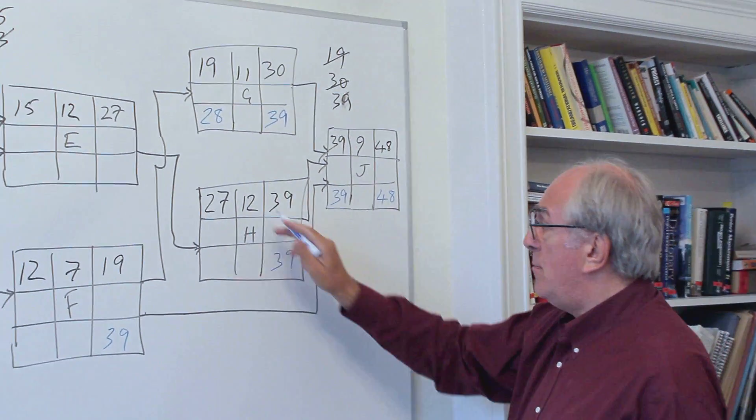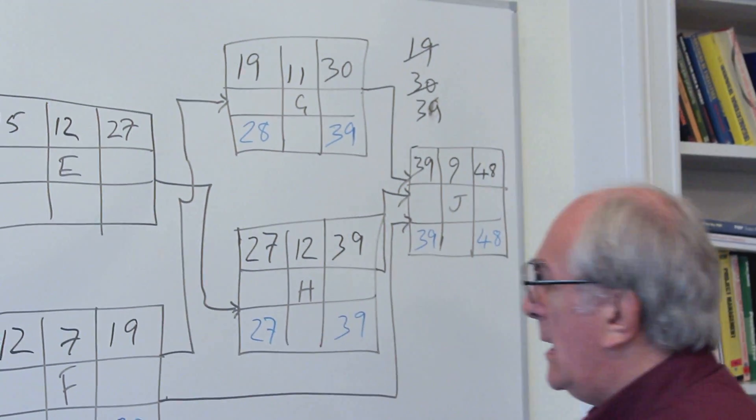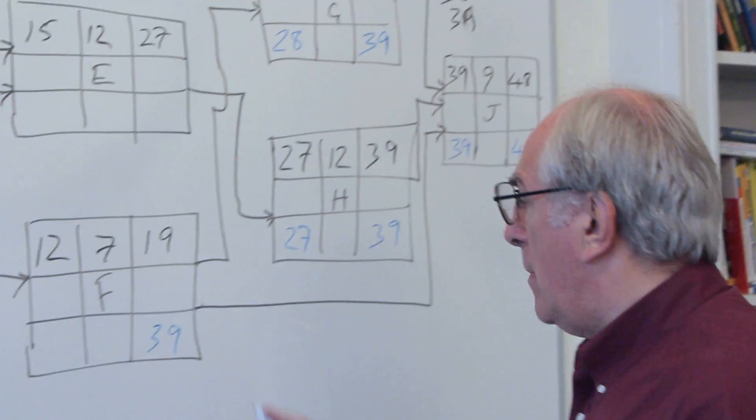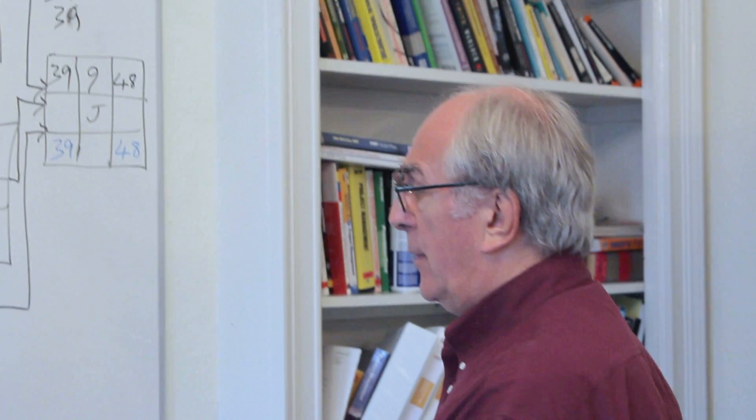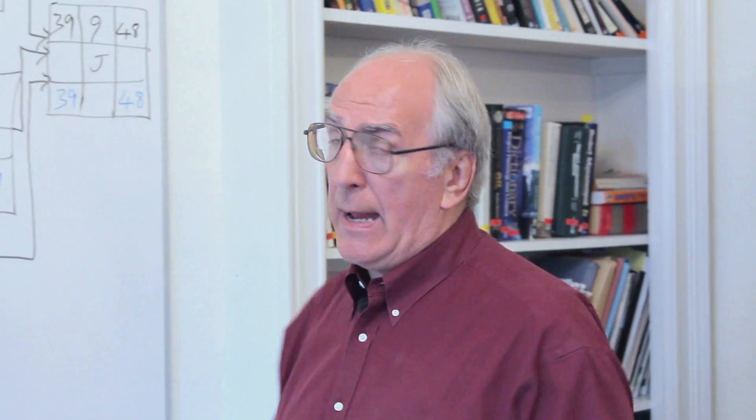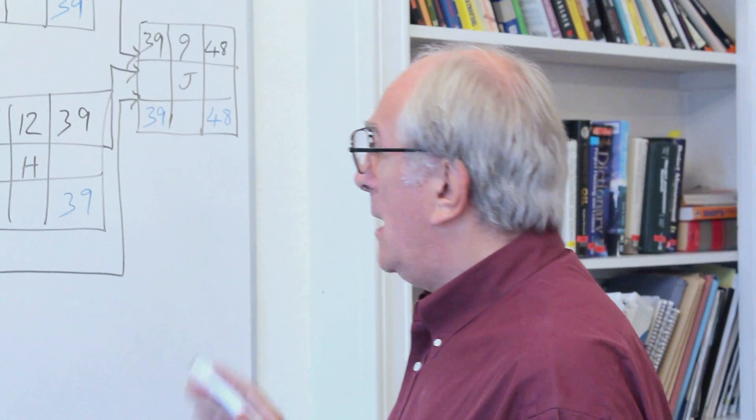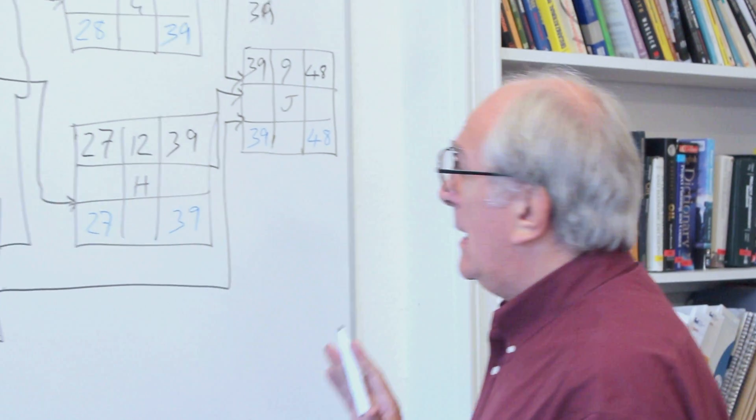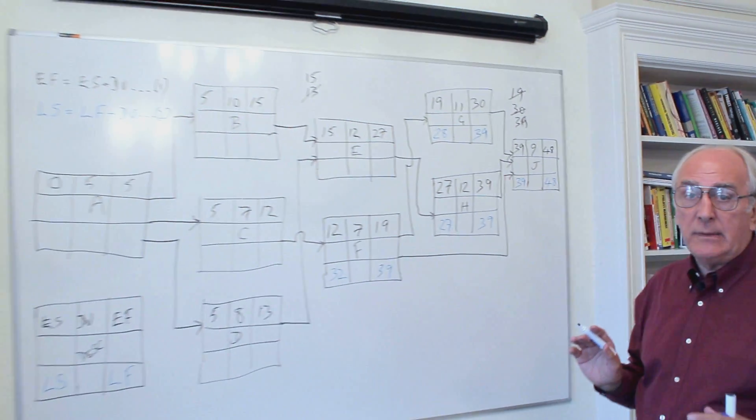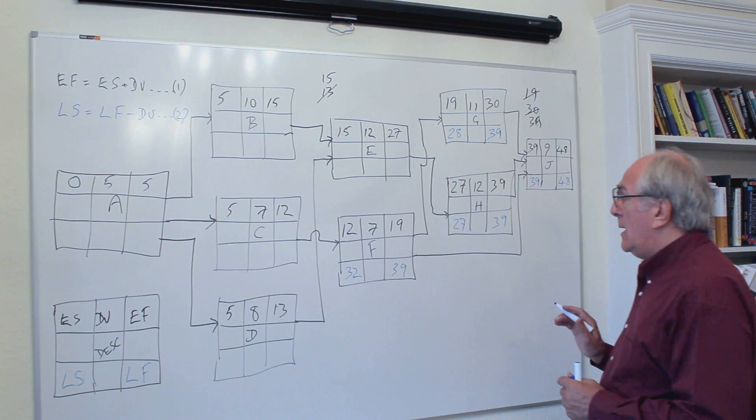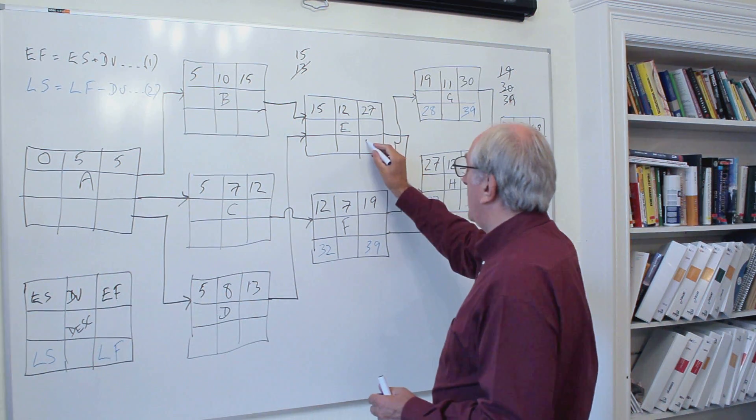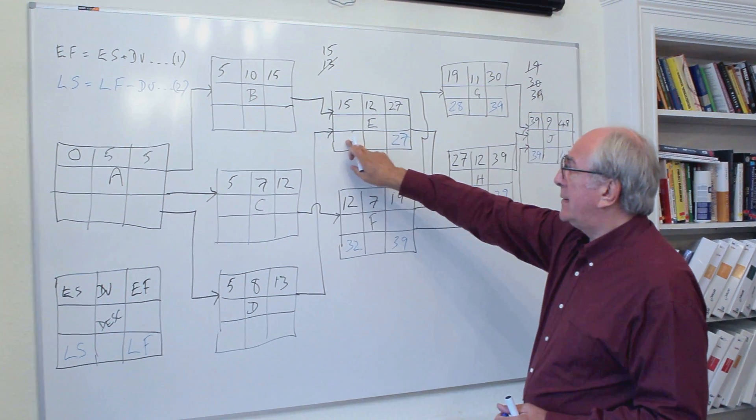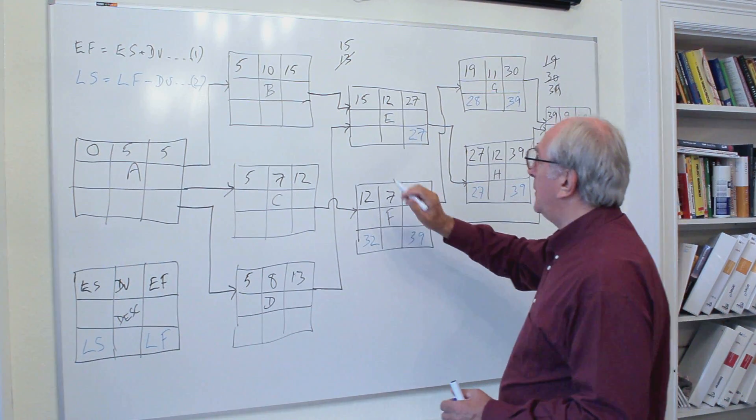On H, we'd have 39 minus 12, which gives us 27. And on F, we'd have 39 minus 7, which would give us 32. So we have the late starts for activities F, G, and H in this backward pass. And we can proceed through this network, eventually finding out all the late start times and the late finish times. So I'll move backwards onto E, and the late finish is determined by the late start of H, which is 27. We can calculate the late start of E by subtracting the duration of 12 from the 27, and that gives us 15.